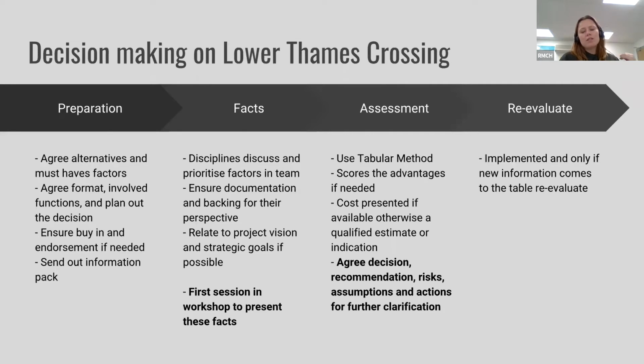Okay, so that is actually captured in the assumptions. Some of these decisions are interrelated, and you can't make them in isolation, but you do need to progress things based on the knowledge you have at a certain time. Sometimes, even though you would wish that you could wait until the final day to make this decision, that means that all the other decisions are not made. So you'll have to capture these things in the assumptions. By planning it out in collaborative planning or last planner, you find a logical way of putting the decisions up there, and then you capture the interrelations in the assumptions, which means that you perhaps sometimes do need to go back and forward a few times.